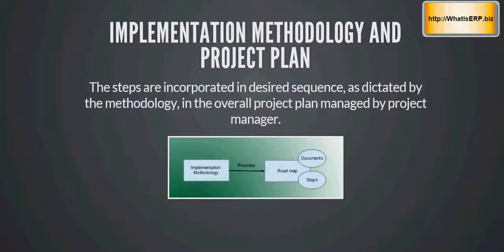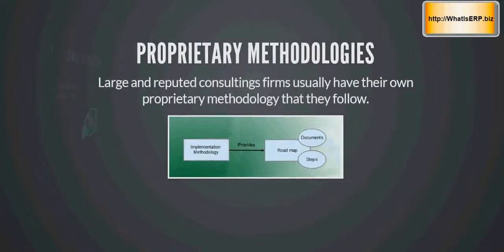as the project plan. For example, the functional consultant may come back to the project manager saying, okay, I have to create these and this document. So I'll take this much time. And these documents have to be signed off by this and that person. So all this will become part of the project plan. Again, keep in mind, methodologies are not married to the ERP software. They are married to the consulting companies.